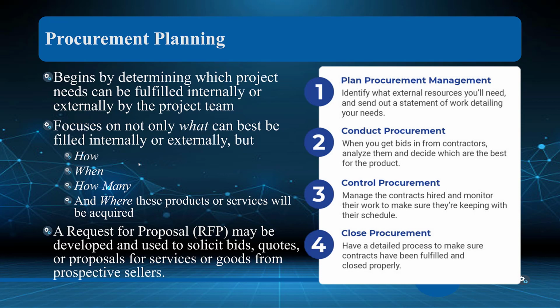You can say, okay, we understand you're not buying nuts and bolts, but we're going to buy a programmer. And how is that similar? And how might that be different? And what are the risks we need to look at? How, when, how many, where will these come from? Don't forget the risks too of what happens if we're outsourcing and that external resource doesn't meet their commitment. So we want to make sure that they've been on projects before, that they have the experience in managing themselves as a company, organization, or individual, as well as integrating with our project.